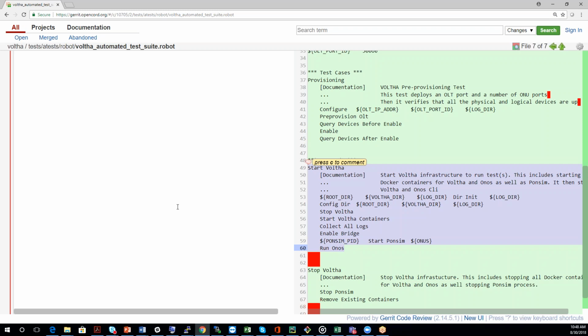Daniel, if you don't mind, add it as a stretch goal to have VOLTHA HA in place also, because there are some behavior differences. Yeah. What is the difference? Also, at one point, we're going to be able to test with a Kubernetes cluster up, have it start an action, and then take out one of the Kubernetes nodes, and we need the system to behave in a reasonable fashion. Assuming that you have both HA and multicast available, what is the higher priority? Which task should go first? HA first. Okay. Yeah.